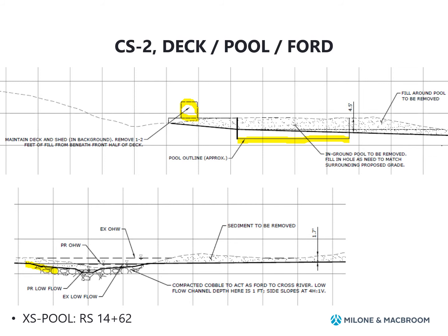The bottom of the river in this location and on the sloping banks would have an application of on-site cobble material that would be selectively chosen to choose some of the larger cobble, grapefruit or basketball-sized rocks, so that we don't wind up with a really sandy or soft bottom in this location. So it wouldn't require bringing in off-site materials to create this ford. It's really just part of the channel shaping.